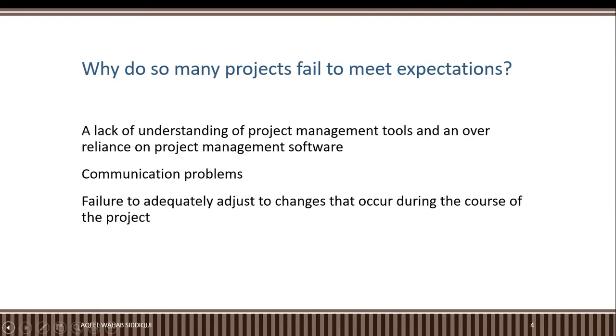If changes occur, he will not facilitate changes directly. Rather, he will listen, he will compile the change and find the impacts of the change. If you are going to make some changes in scope, obviously it will affect time, cost, quality, and budget, everything.